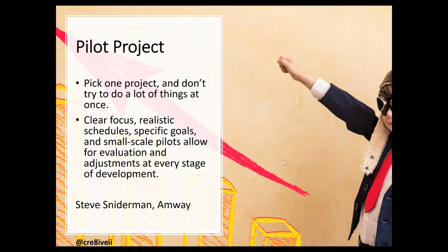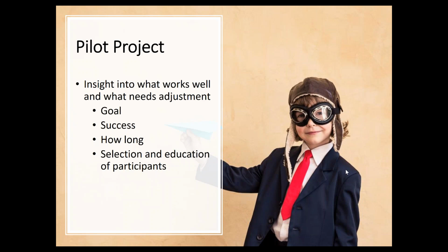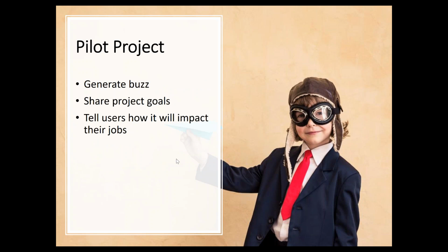So you want to have in this pilot project, pick a specific goal, what you're going to deem as success for the project, how long you're going to run the project, and then who's going to participate in the project. I think it's really important to generate buzz and share project goals and tell users how it's going to impact their job as well. So those are all things that are really important.